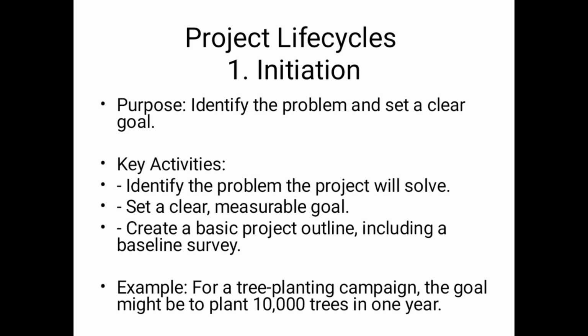One thing that we need to understand is that without a problem, there cannot be a project. A project comes to address a certain problem. So that is found during the initiation phase. The key activities are identifying the problem, as we have already said, then setting clear, measurable goals, then creating a basic project outline, including a baseline survey. It's just a survey for trying to identify the problem.